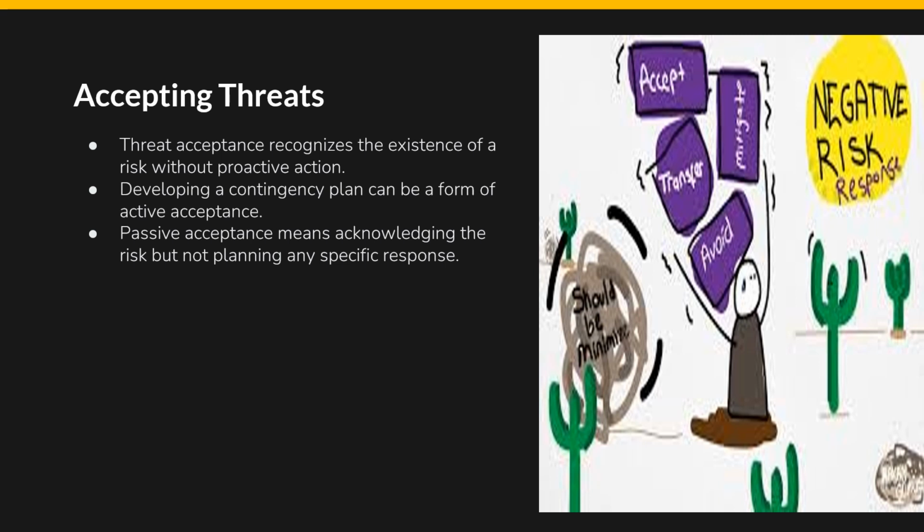Minor IT system glitches. In a software development project, the team identifies the risk of minor glitches occurring in the system after deployment. The team assesses that these glitches would not significantly impact the end user's experience, and they might be addressed through updates or patches later on. Considering the limited impact on user satisfaction and the availability of easy fixes, the team decides to accept this risk rather than investing substantial resources in exhaustive testing and debugging before deployment.